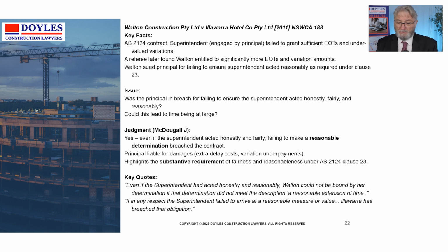Other ways in which latent conditions might be recovered, if you've hit a latent condition and it's a bit awkward, again under a contract. In this case, Walton Constructions v Illawarra Hotel, Waltons were entitled to significantly more EOTs and variations, and they sued the principal for failing to ensure the superintendent acted reasonably. The superintendent was supposed to act reasonably under his contract. He'd certified very little for these things, and the question was, was the principal in breach for failing to ensure that the superintendent had acted reasonably? And could this lead to time being at large and other aspects of the contract?